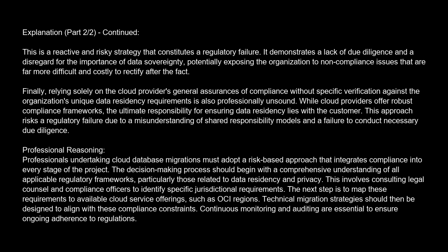The decision-making process should begin with a comprehensive understanding of all applicable regulatory frameworks, particularly those related to data residency and privacy. This involves consulting legal counsel and compliance officers to identify specific jurisdictional requirements. The next step is to map these requirements to available cloud service offerings, such as OCI regions. Technical migration strategies should then be designed to align with these compliance constraints. Continuous monitoring and auditing are essential to ensure ongoing adherence to regulations.